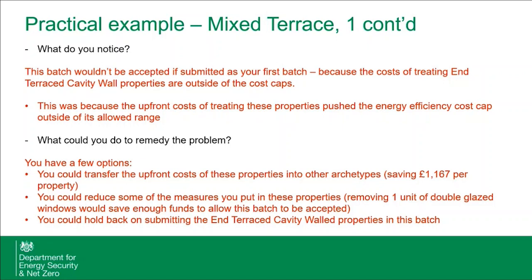Because if we paid them out of A&A, we'll have paid them potentially to supply. If we've put them in capital, you'll potentially have said, no, you can't have the capital allowance for the upfront costs. That's fine. So we've had this question before, and generally where a property isn't progressed, we expect those costs to be put in as A&A because they don't relate to the installation of measures in an actual property that was capitalised in the first place. So yeah, log those costs as an A&A.